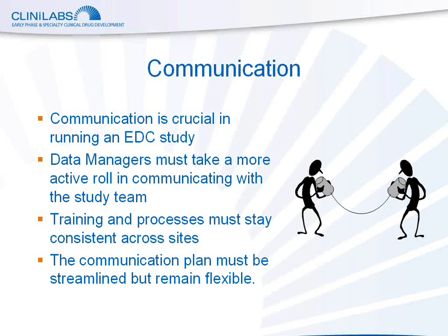It's essential a solid communication plan is in place at the beginning of the study. As mentioned with roles and responsibilities, it's also vital that the communication plan is streamlined and there are not 20 different people to contact for 20 different issues. The larger the EDC study, the more essential it is that points of contact are established.